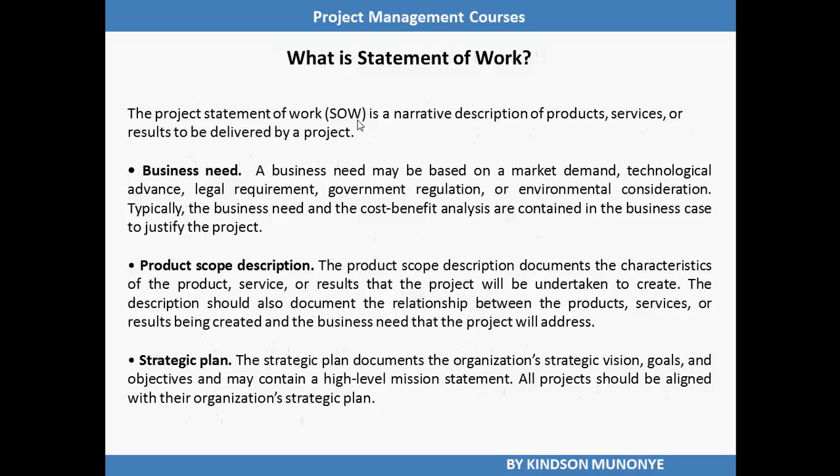So one of the inputs to develop project charter is the project statement of work, SOW. What is a statement of work? It is simply a description of the product, services, or results to be delivered by the project. The statement of work contains items like the business need, the product scope description, and the strategic plan. The business need may be a market demand, a legal requirement, a government regulation.